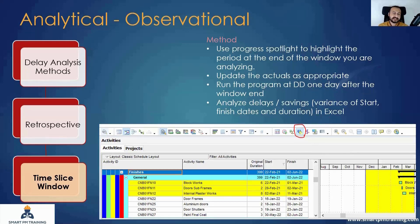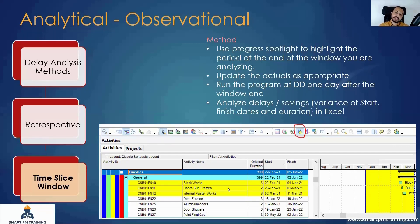The easiest option to do this in Primavera 6 is to use the Progress Spotlight option. You click on the Progress Spotlight icon and drag the yellow area up to 31st of March — the end of the window. It will automatically highlight the corresponding activities in the program of work to show the planned work within this period. You already have your monthly update in hand.